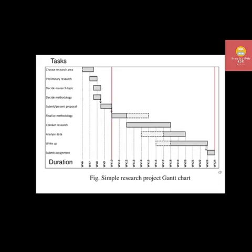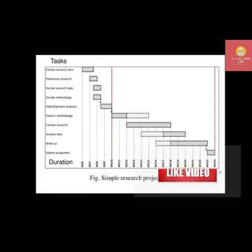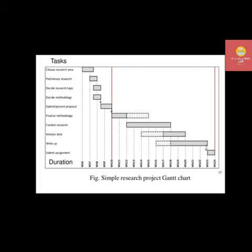Here is an example of a simple research project Gantt chart. There are a total of 24 weeks for the research, with various activities including: choose research area, preliminary research, decide research topic, decide methodology, submit research proposal, finalize methodology, conduct research, analyze data, write up, and submit assignment. The activities run from top to bottom, and in this Gantt chart we can clearly see the progress of the project.